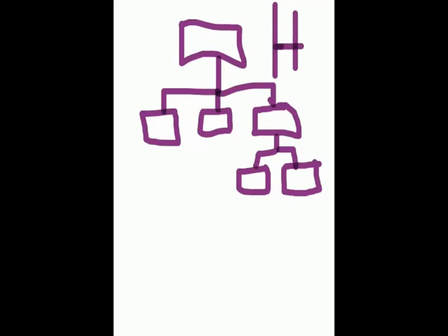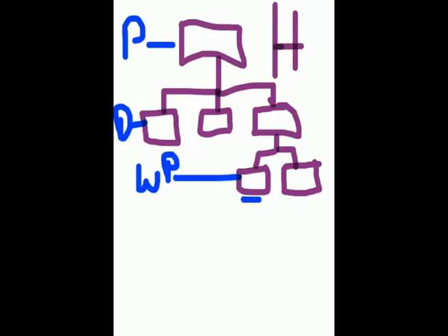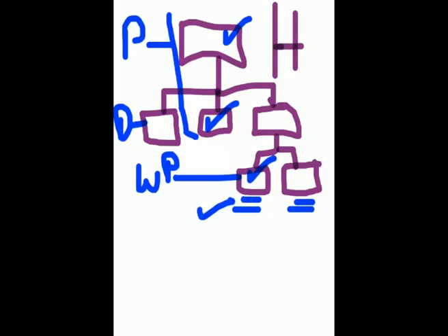Okay, so now, this is called the project level. This is called the deliverable level. This is called the work package level. Below here are the activities, which we're talking about right now. Now, mind you, there could be multiple levels. I'm just giving you the big picture. The project level, the deliverable level, the work package level, the activity level. So just know that we are, the big D word, decomposing the project. Very high level stuff, but remember, this is a hierarchy.